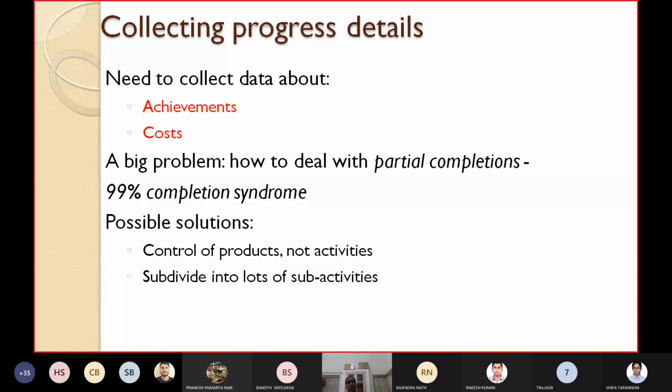If it is based on completion of records, say how many records you are entering per day, then counting the number of record specifications made daily is a reasonable measure of progress. Similarly, how many screen layouts you produce per day is another reasonable measure.